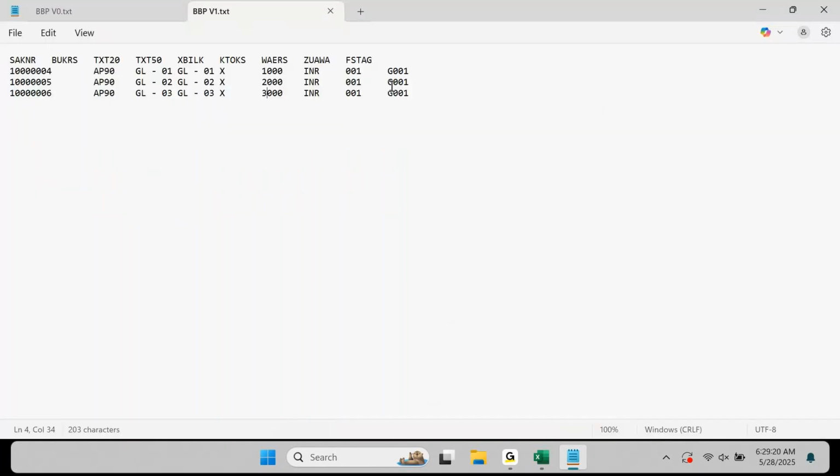If you look at this, this is your version 0 document. This is version 1 document. Tomorrow if there are any additional things which are added, I am not supposed to add in version 1. If they want to add a 4th line, like 4000 also, do I include it in version 0, version 1, or do I need to create a version 2 document? Version 2, sir.